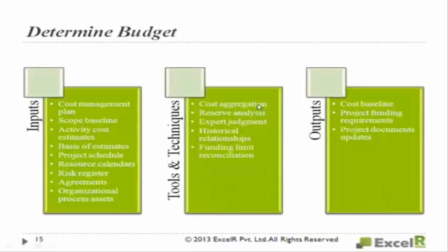Even when you are producing the final budget, you will take old projects. For them, how much did designing cost? For me, how much has it come to? For them, how much did testing cost? For me, how much has it come to? You'll go and check, right?